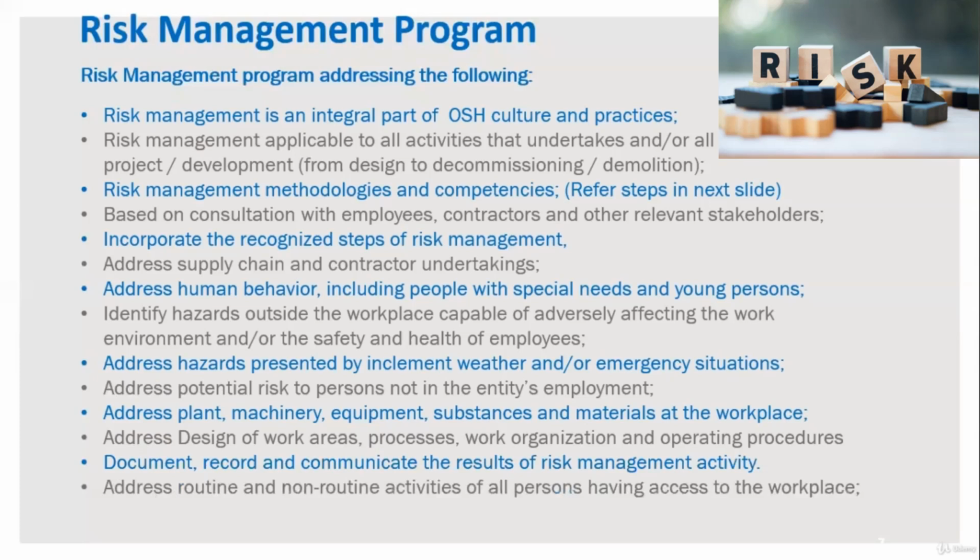Address routine and non-routine activities of all persons having access to the workplace. So we have to identify what kinds of activities are routine, and what kinds of non-routine or high risk activity there are in the organization. All routine activity requires only a competency, whereas for all non-routine or high risk activity, you need a work permit and a risk assessment.